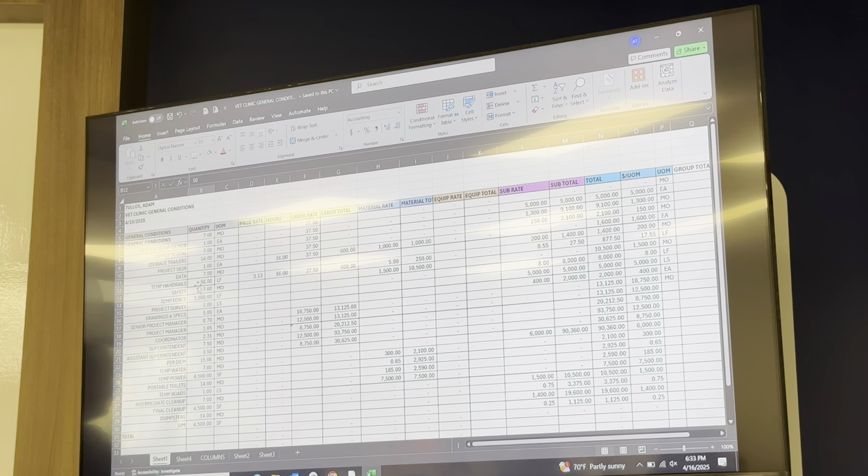Data, same thing. Temporary handrails, you're probably gonna need some just off that southwest corner of the building, because that foundation wall is like 6 feet high. You really don't want anybody to fall off that. So maybe run some handrails in that area.